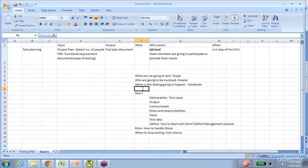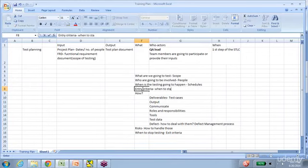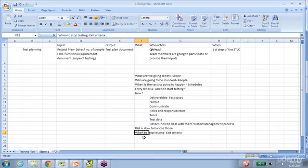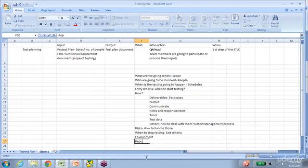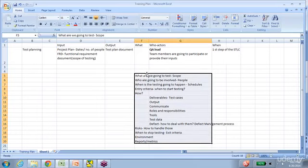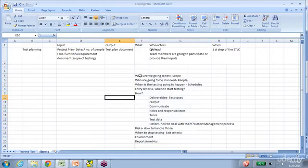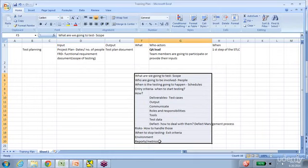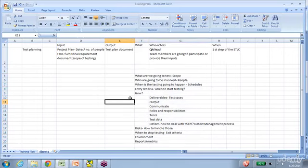The test plan includes entry criteria — when to start testing — and exit criteria — when to stop testing — along with the environment in which testing will happen, and any reports or metrics to be collected. These are all the constituents of a test plan. This is also an important interview question: what should a test plan contain, or what is the table of contents for your test plan? Briefly, these are the components interviewers are looking for.